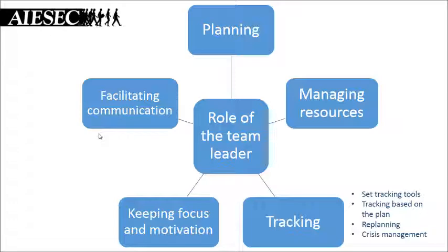The third important thing is replanning, meaning that if you do go over a deadline, you need to come up with how you are going to still make it on time. So meaning you will need to plan less time for some other activities, or you will have to replan the entire activity.